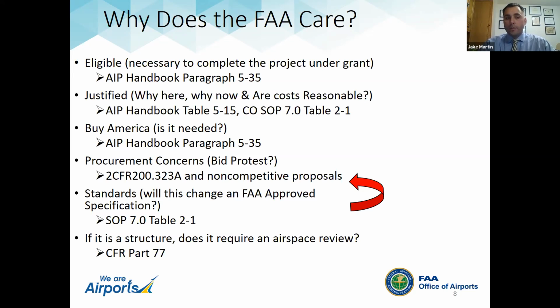Buy America: we need to make a determination on whether any steel or manufactured goods in the project, if you're going to remove or add those, change whether or not the project meets the 100% domestic material provision in legislation. Or if you already have a waiver for that project, is the addition or deletion of these materials through change order going to adjust the content percentage below the threshold where a waiver would no longer apply?